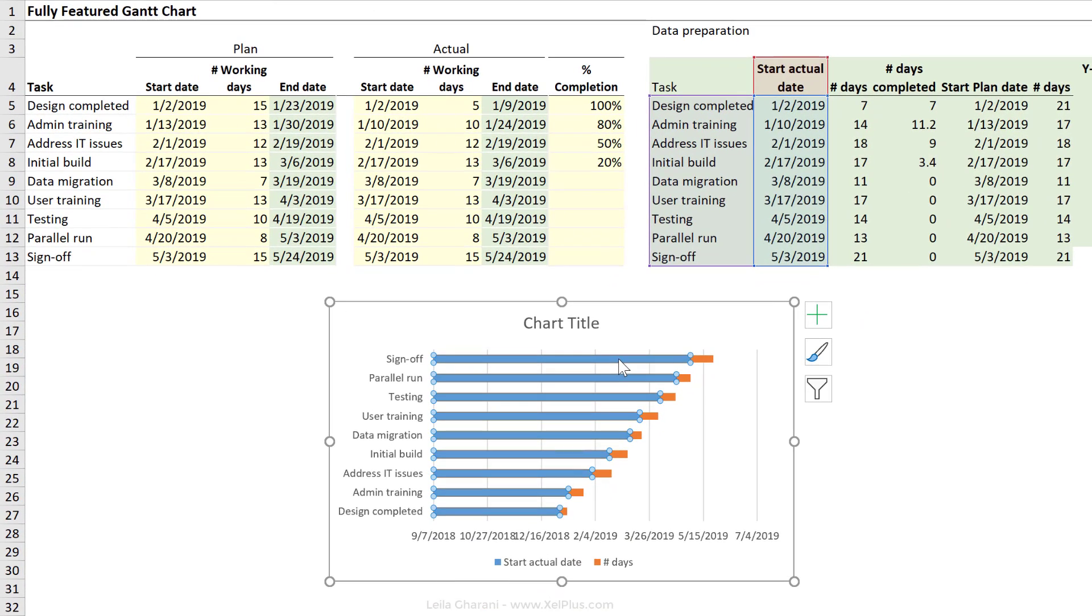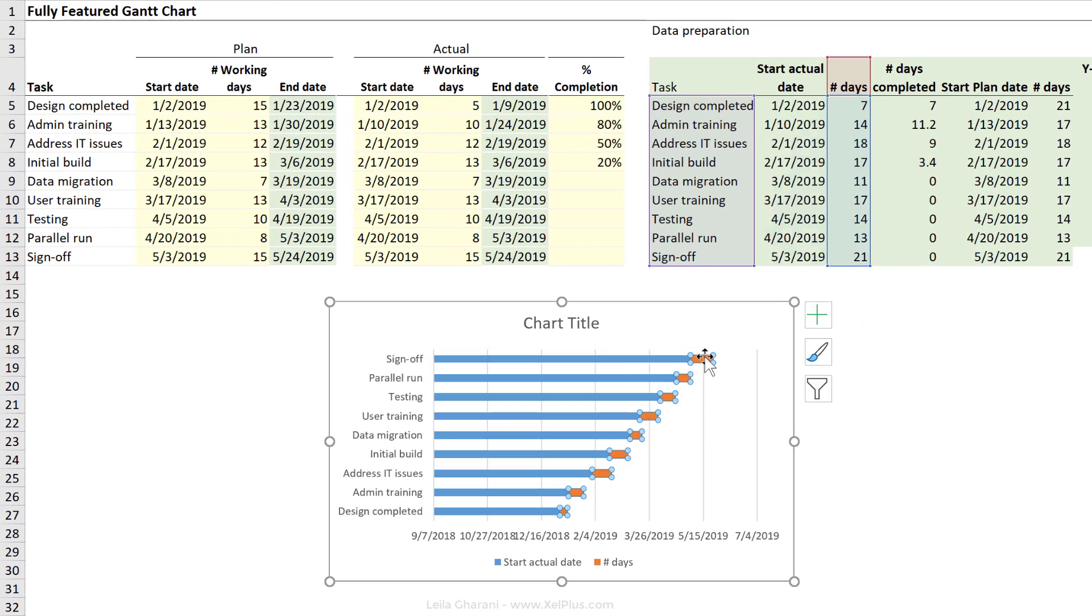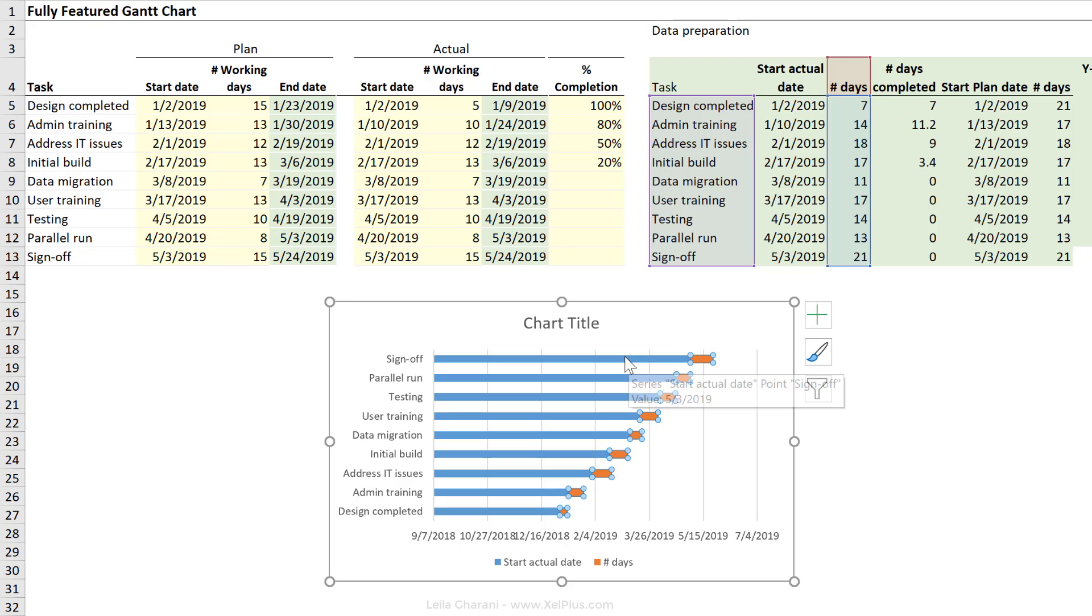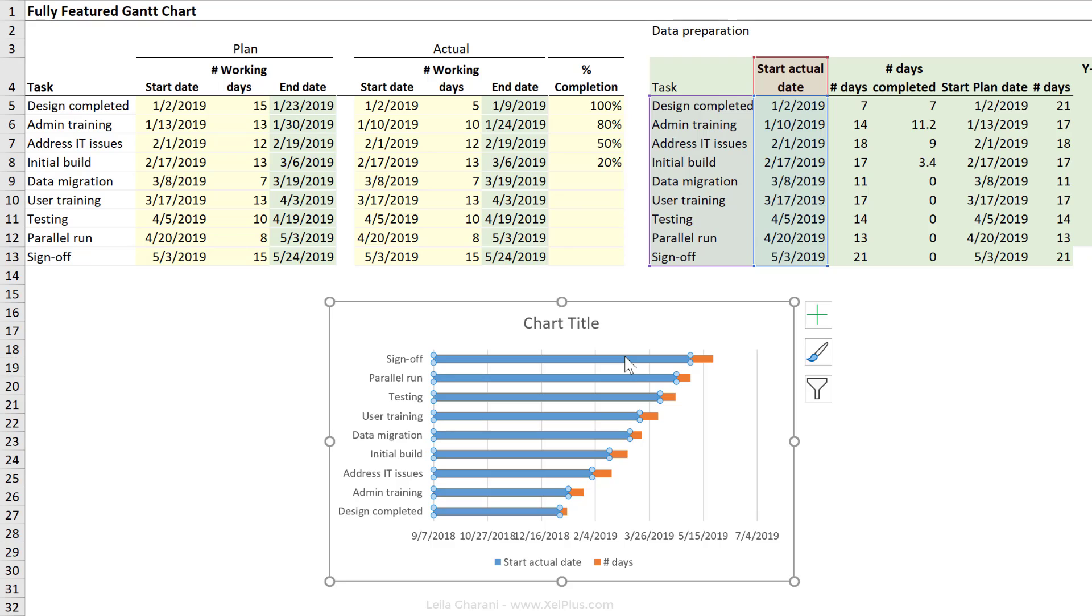I have a stacked bar chart. First stack is this date. The second stack is the number of days. This is actually the important piece of the puzzle here. This part is something I'm going to hide from view. So I'm going to make this invisible.